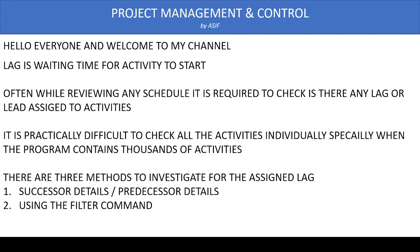We can find some way to determine activities assigned with lag using the filter, but you have to verify that all activities shown in the filter are correct. The third and most reliable method is using the Reports option in Primavera P6, where you can apply a filter for lag. It is very easy, accurate, and not very time consuming.